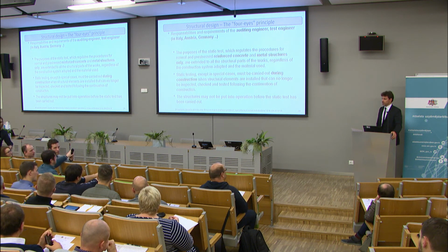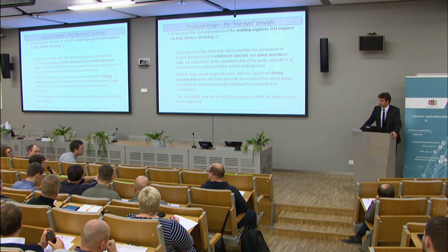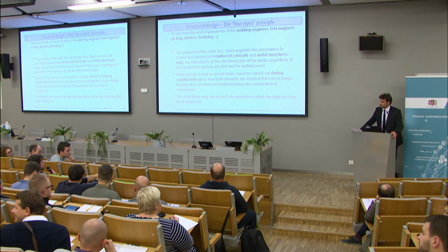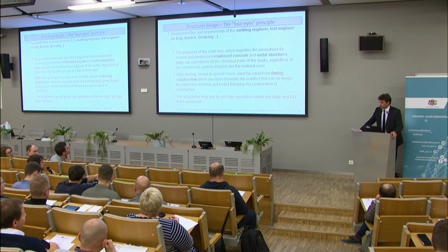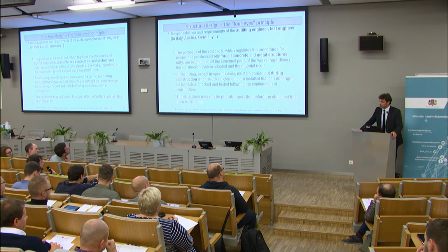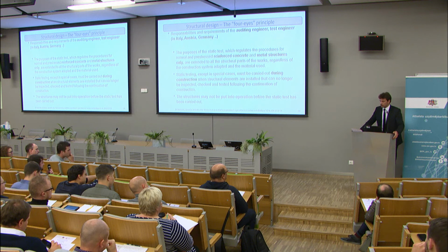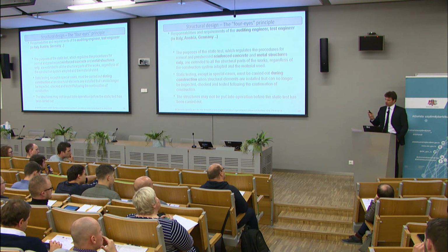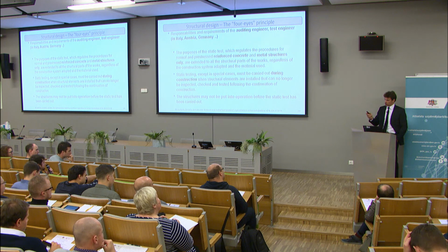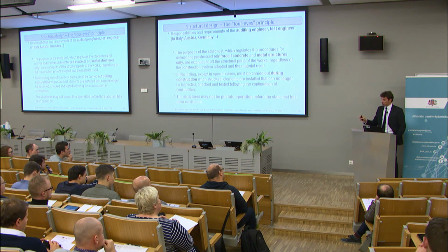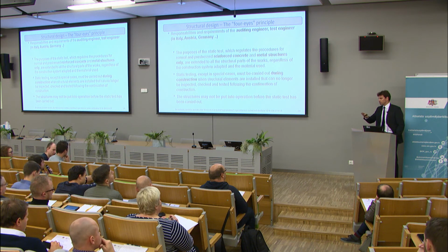I have a question about this external reviewer on the construction phase. If the design is changed during construction, does he check once more during construction, or does he check after construction is complete? Yes, when they make relevant changes during the construction, they have to ask both the designer and the reviewer, who must allow a relevant structural change. And of course, he always controls the structure as built when it is built.